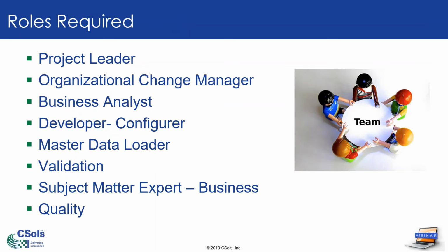So what are the roles that are required for a laboratory informatics project? Well, you're going to need a project leader. Some people term that as project manager, and I'm going to go through the differences. You also need an organizational change manager, and we're going to go more deeply into what that means. You need a business analyst. You need a role that's both a developer and a configurer. They can be one role, or they can be separated into 2 independent roles. You need a master data loader, and we're going to speak about metadata and what that entails.